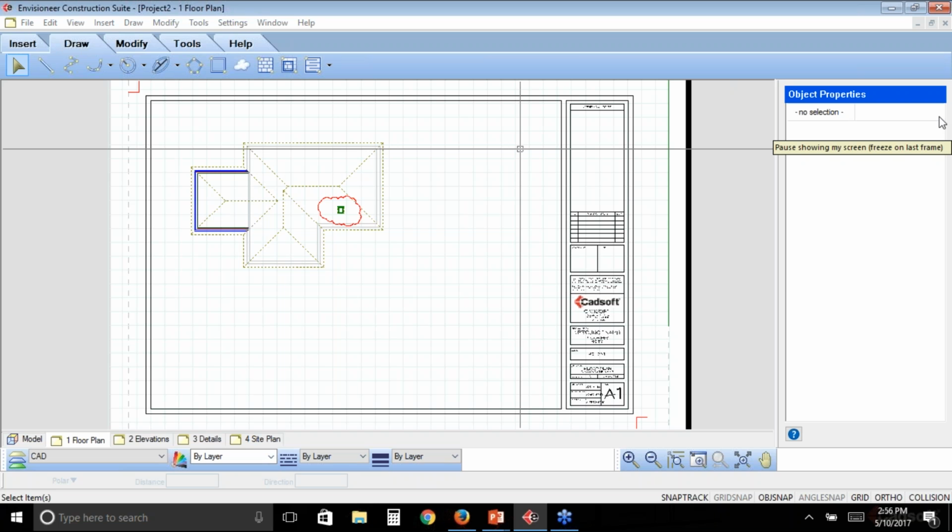So let's say, for instance, that I wanted to bid out the home we were working on earlier, the framing package with 3 different framers or suppliers. I can actually create a bid package within that job, within Buildertrend, send it to the correct subs and vendors that I want to bid, and I can attach the appropriate documents from Cadsoft for them to review. So that would all be done within Buildertrend, but you can then grab information from Cadsoft in the way of documents to attach to those bid requests. That's great. Wonderful.